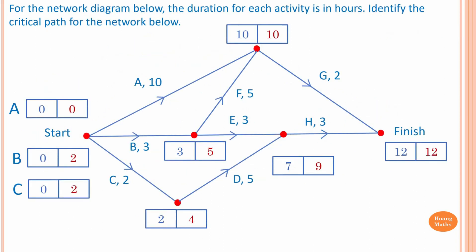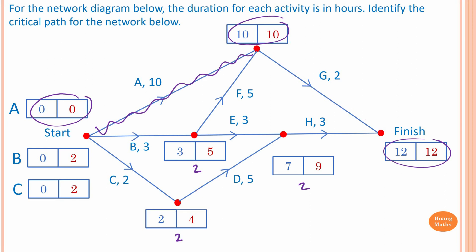Please stop the video and try this one yourself. To identify the critical path for this project: the float time for the first activity is 0, so that path is critical. The float time for the other paths is 2 hours each, so they are not critical. The next critical activity is G, so the critical path is A to G, and the shortest time to complete the project is 10 plus 2, which equals 12 hours.